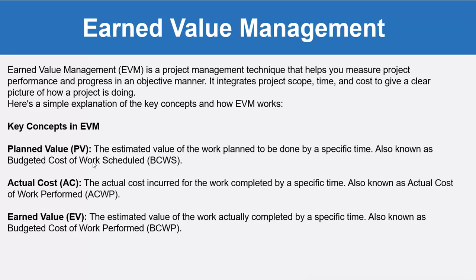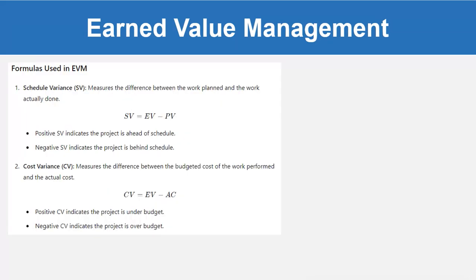The key concepts involved in earned value management are: Planned Value (PV) — the estimated value of the work planned to be done by a specific time, also known as Budgeted Cost of Work Scheduled (BCWS). Actual Cost (AC) — the actual cost incurred for the work completed by a specific time, also known as Actual Cost of Work Performed (ACWP). Earned Value (EV) — the estimated value of the work actually completed by a specific time, also known as Budgeted Cost of Work Performed (BCWP).